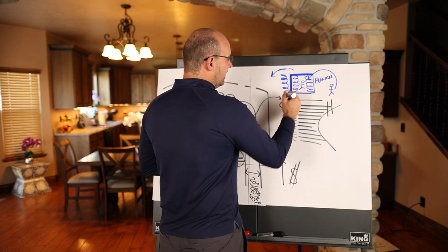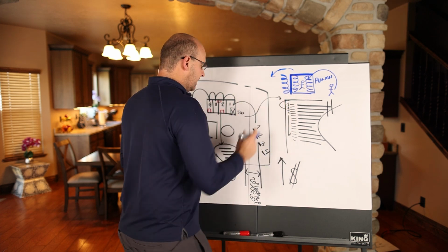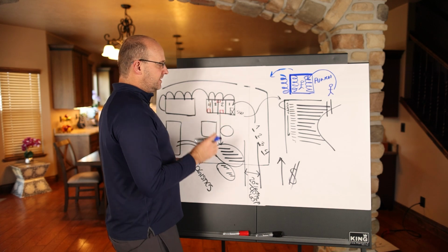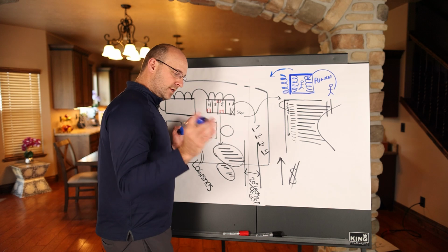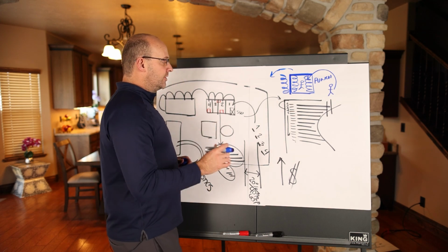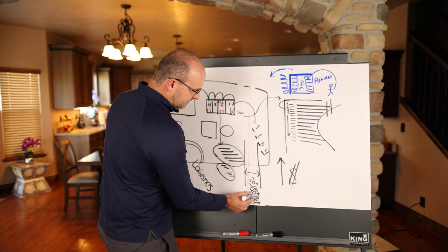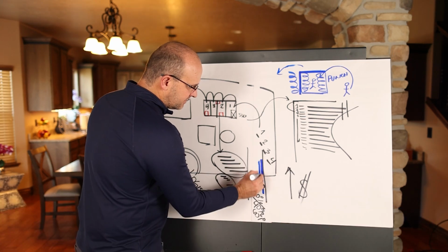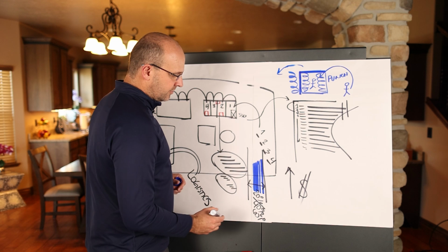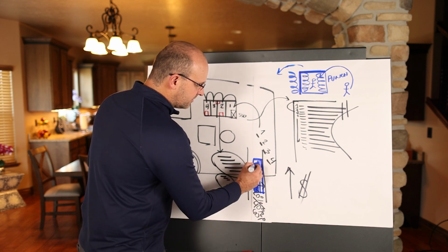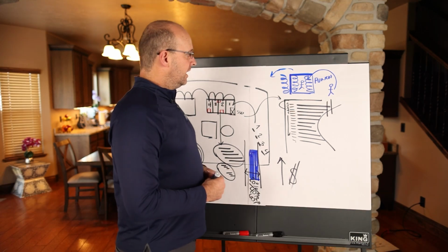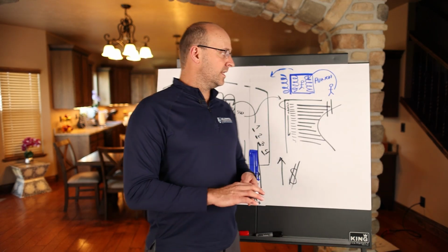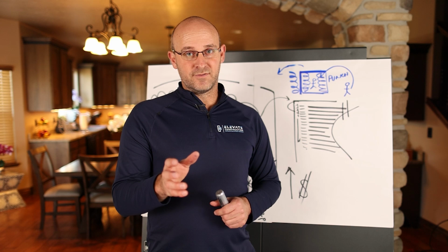And this handoff, the time where you switch from this zone to that zone for each of the trade partners, must be managed and monitored. If you can manage those 2 to 3 handoffs per day, you can maintain that flow and realize this 20%. Even if things go bad and you have delays, you're going to realize at least 1/3 to 2/3 of that time savings, which amounts to a massive amount of money and a massive benefit to you. So find your Lego, find that repetition, and then work with zone control throughout your multifamily project.